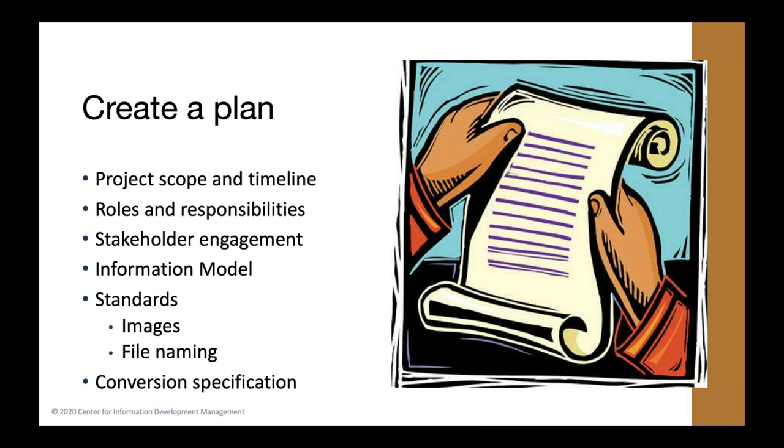Identify the roles and responsibilities of project team members. Be sure that you have a kickoff meeting to review your plan of attack. Get their input, especially if you encounter unexpected resource or time costs. Identify your risks. Create a budget or provide input to a budget if you're not responsible for the project dollars. This is where the scope is essential, especially if you have to get estimates from conversion vendors. Create a project timeline and add the specific milestones. Determine a progress reporting framework, and this is another one that's really, really important. When, where, and how often will you update the key stakeholders or project sponsors on your progress to date? That's a really important one for expectation management that I found.